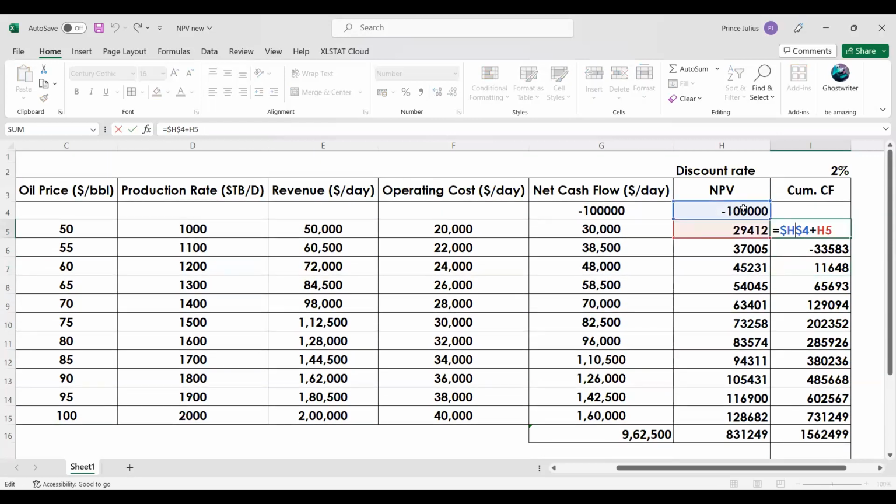First of all, we need to put the value of the initial investment plus the first year NPV that you have to select. From the second year onwards, you need to add all the NPVs to the earlier cash inflows. So second year NPV plus earlier cash inflow, that is the cell, and third year NPV plus cash inflow, that is the cell. Fourth year NPV plus cash inflow, fifth year NPV plus cash inflow. Like that, you have to go forward.